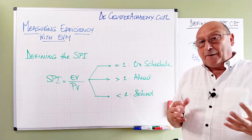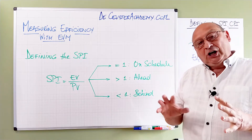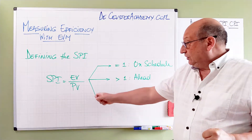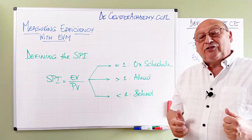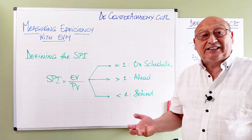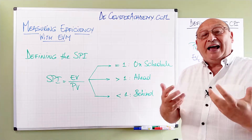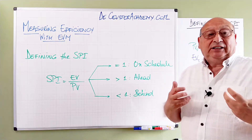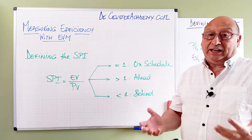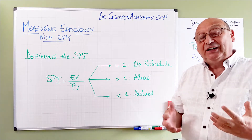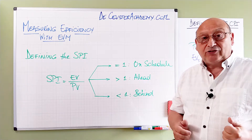We have to be careful interpreting these parameters, but that's for later. Now, imagine I expected to have finished five deliverables and I finished six — this means I am performing better, so I'm ahead of schedule. In that case, the schedule performance index SPI is larger than one. That's a good sign, but going faster can also have some consequences on the budget and on the progress of the project.